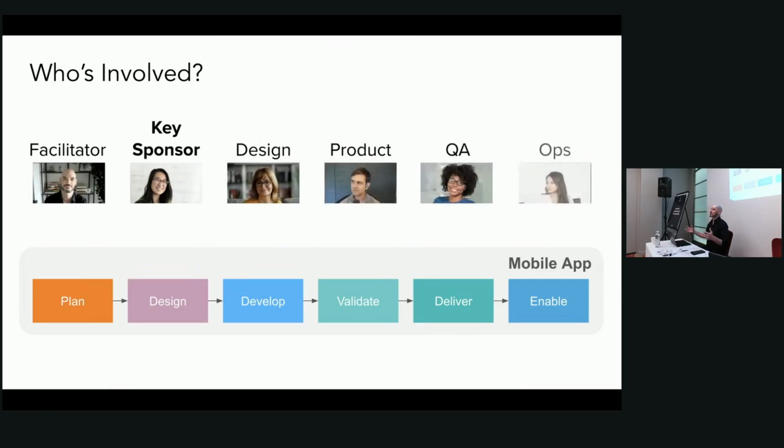And then you have representation from across the value stream, right? So what are the different groups that are involved in handoffs? What are the capabilities and skills that are represented in getting that work from plan to delivered and enabled in production? And we want the fullest representation of this as possible, because our constraint could be anywhere along that flow. And if we're looking at a narrow slice, we're liable to miss it, right? We're liable to focus on something that isn't actually the overall constraint.